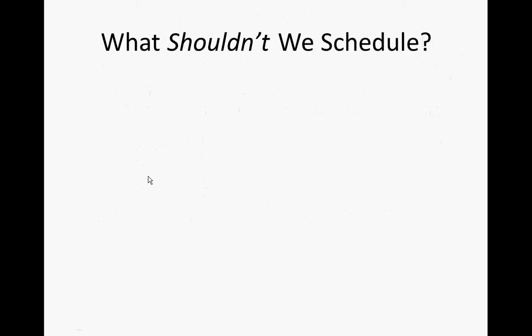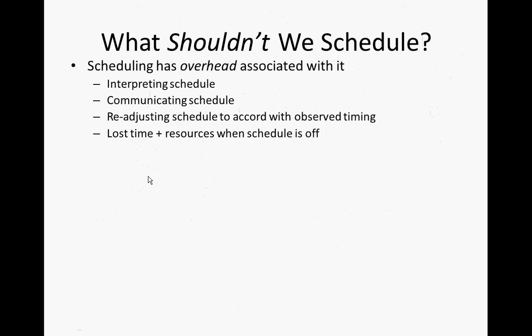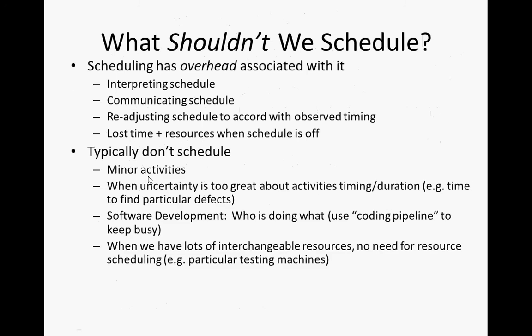Often left unsaid in these lectures is, what shouldn't we schedule? Well, scheduling is so great. Why not schedule everything? Choreograph everything down to the microsecond at which it's going to occur. Well, it turns out that there's overhead associated with it. Interpreting the schedule, communicating it, readjusting the schedule when things fall off of it. And this can require effort. It requires effort on the part of project managers or others who are involved in scheduling. So typically we don't schedule really minor activities.